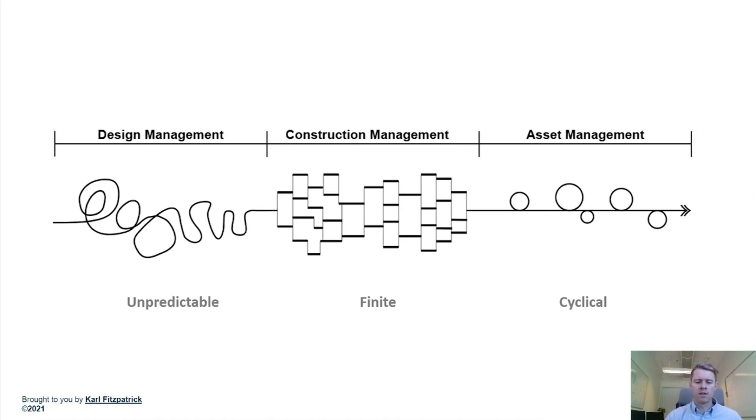On large projects, often the engineering consultancy is the lead appointed party, and the architecture team is an appointed party to the engineers. This can often result in the project BIM manager having an engineering background who naturally prefers a more linear approach to BIM. This can impose restraints on the more unstructured nature of the design process and can lead to an overly complex BIM process. The unpredictable nature of design is an engineering BIM team's worst nightmare, as it all leads to significant levels of remodelling which hasn't always been budgeted for. Many of you will probably have experienced the resistant MEP or electrical engineer who refuses to change their model anymore.